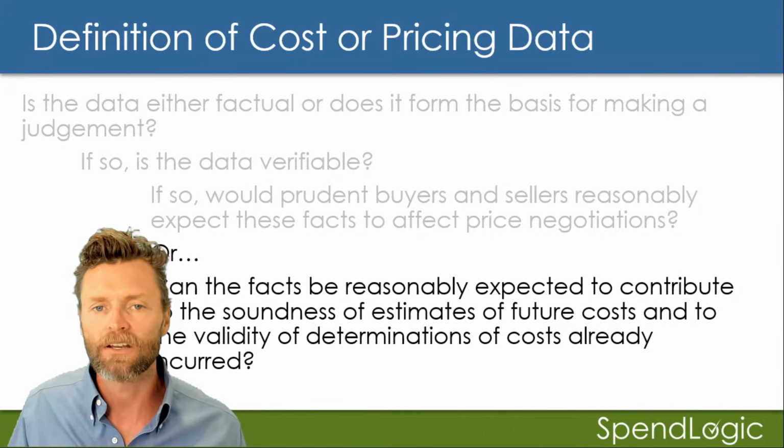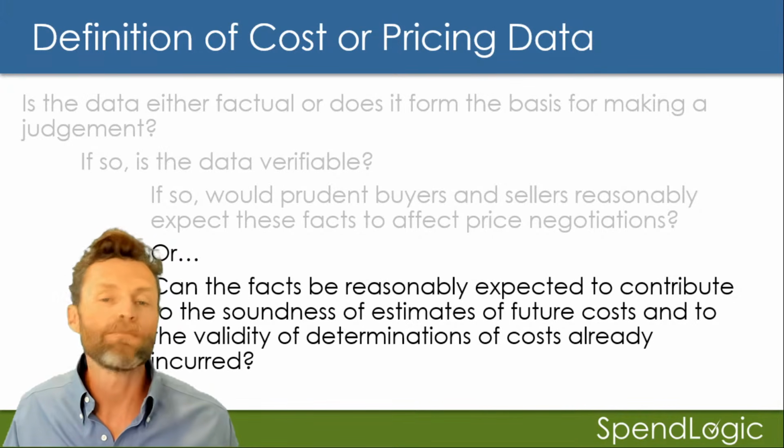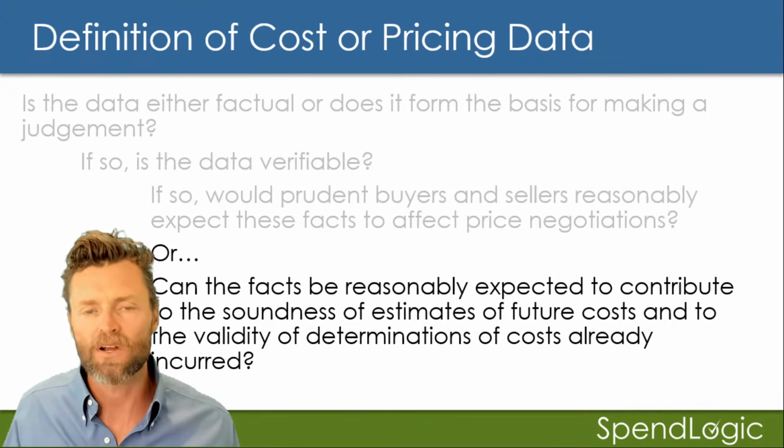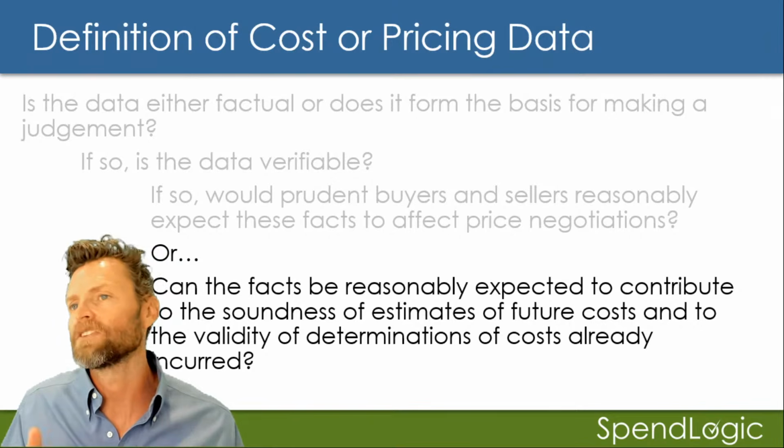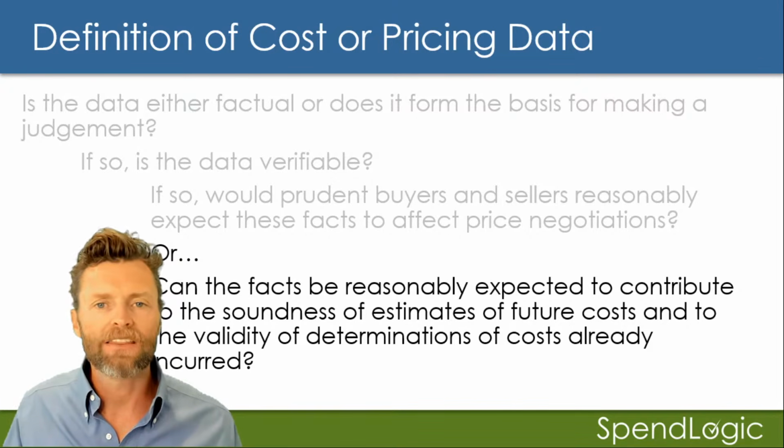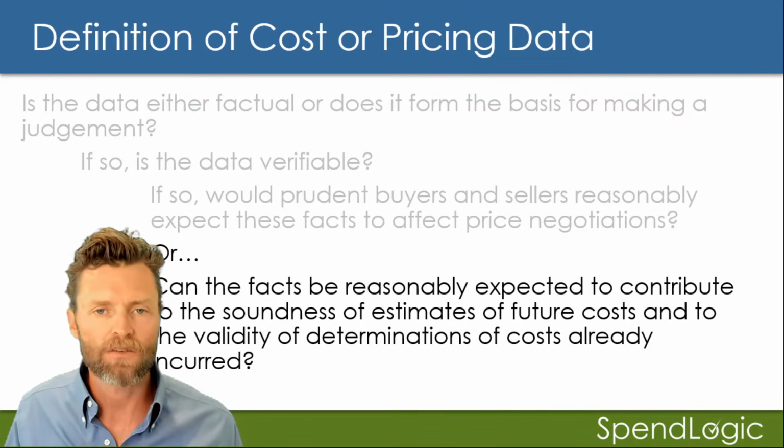If you go past this smell test, then it means it's probably something that should be cost or pricing data. If it's not factual data, if it can't be verified, if it's just hypothesis, then it probably isn't certified cost or pricing data.